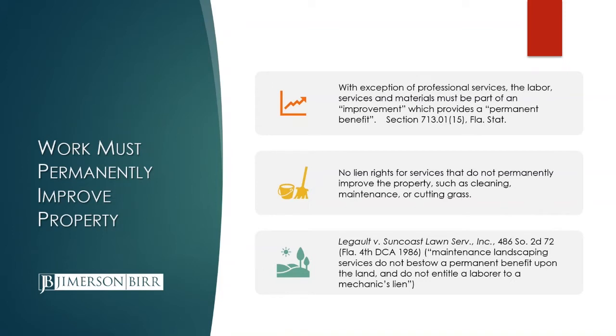Another requirement for lien rights is that the work actually has to permanently improve the property. With the exception of professional services, the labor, services, and materials must be part of an improvement which provides a permanent benefit, and that's defined in 713.0115 Florida Statutes. So what that means is there's not going to be any lien rights for services that do not permanently improve the property, like cleaning or maintenance or cutting grass. Those kinds of things don't make permanent improvements to the property, and so there's not going to be lien rights.